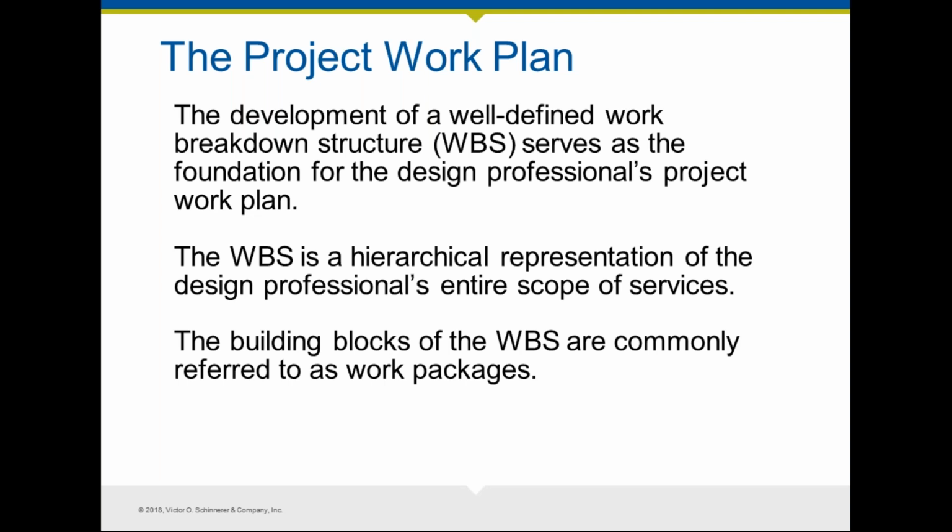It's a hierarchical representation of your entire scope of services, and the idea is that you're breaking this up into building blocks that are commonly known as work packages. And typically, each work package has an identified deliverable at the end of it, so that you can plan resources accordingly.